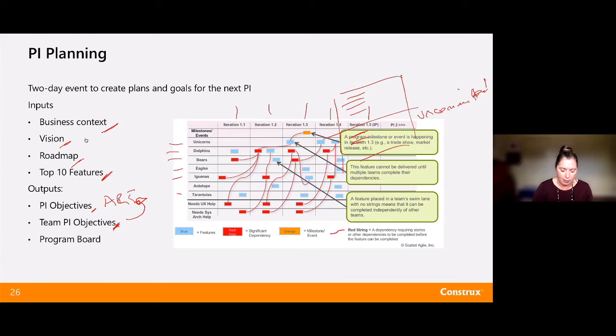I think that this team's going to deliver something fairly early in iteration 1 of this upcoming PI to be consumed by another team in iteration 2. So you start to get that feeling for the pieces where I need work of multiple teams coming together to deliver value across this grouping of teams. And I think that visualization and that understanding is really helpful going in, and then we can use things like Scrum Master Syncs and PO Syncs to make sure that we keep up to date on that as the PI progresses.